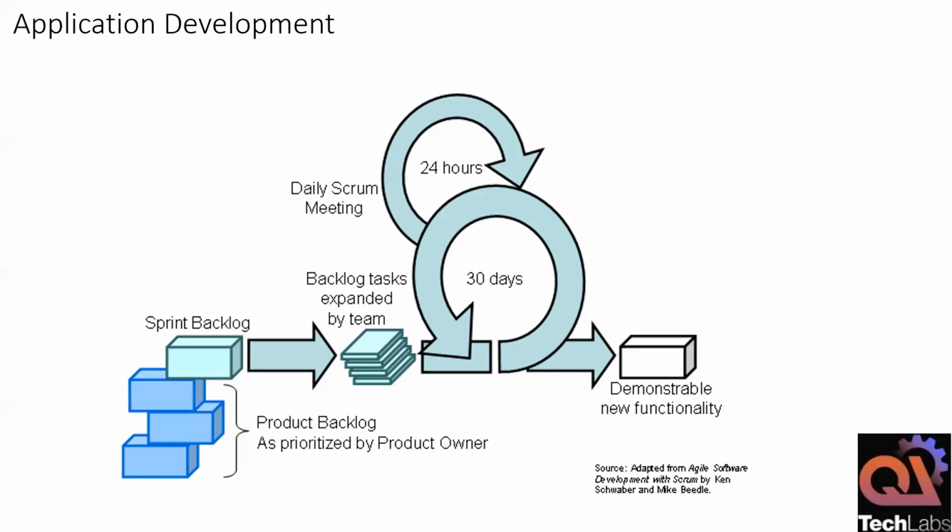So what does it mean? We create a set of backlogs. So what are these backlogs? These backlogs are called your stories, right? All the building blocks you will write in the form of stories, and then you will put them under the backlog. Then your product owner will come in and figure out which are the important building blocks that we need to take, and they will set those as important priority. So there is a concept called MoSCoW, Moscow. What does it mean? Must have, should have, and could have requirements, right?